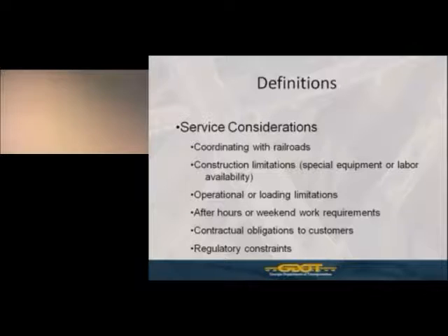And keep in mind, if you don't properly account for these downtimes, the clocks will still be ticking on your schedule. So that's why it's critical for you to make sure you've captured any dependent activities that will prevent you from performing active work until such dependent activity is completed. That's why it's critical to account for those dependent activities.